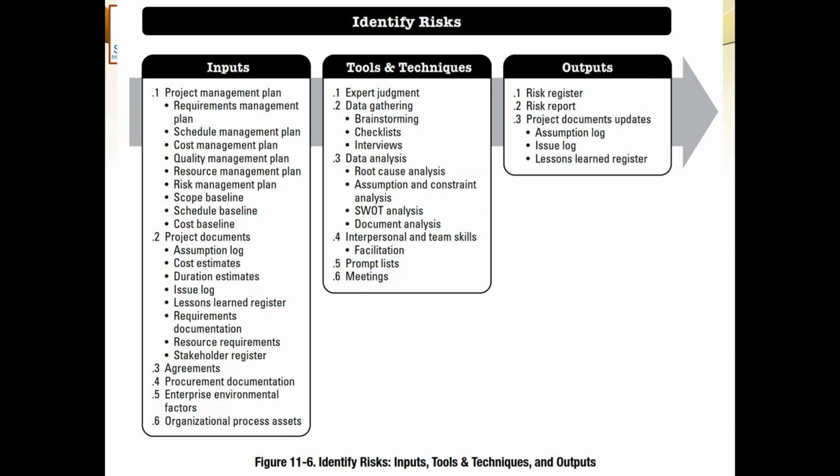Similarly, let's go to quality. We created the quality management plan. Quality management plan definitely goes to the project management plan, but it is not only the quality management plan which is created in that process. There are many other documents and artifacts created, and they include various templates, checklists, inspection schedules and all that. So all those things form part of the project documents. Then you can deal with all other knowledge areas. Every knowledge area will give its management plan to the project management plan and the other artifacts to project documents. So project documents will have a huge number of documents lying in there.